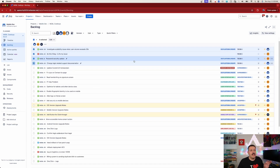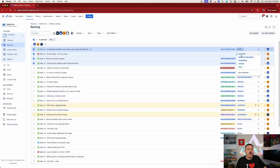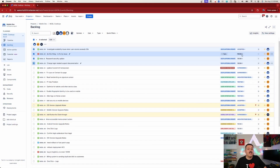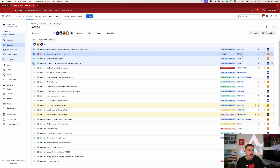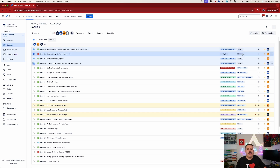So in the backlog view, I can now select those four stories. You would be tempted to come over to the right and hit the dropdown to transition it — but my friends, that would be the incorrect way of doing this, because if you do that, it only transitions the very first one that you selected. So we don't want to do that. We're going to put that back to 'To Do.'